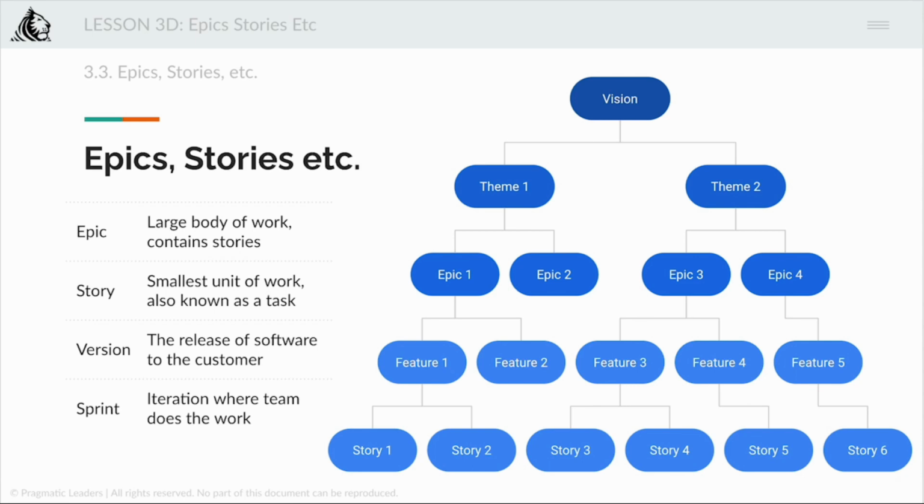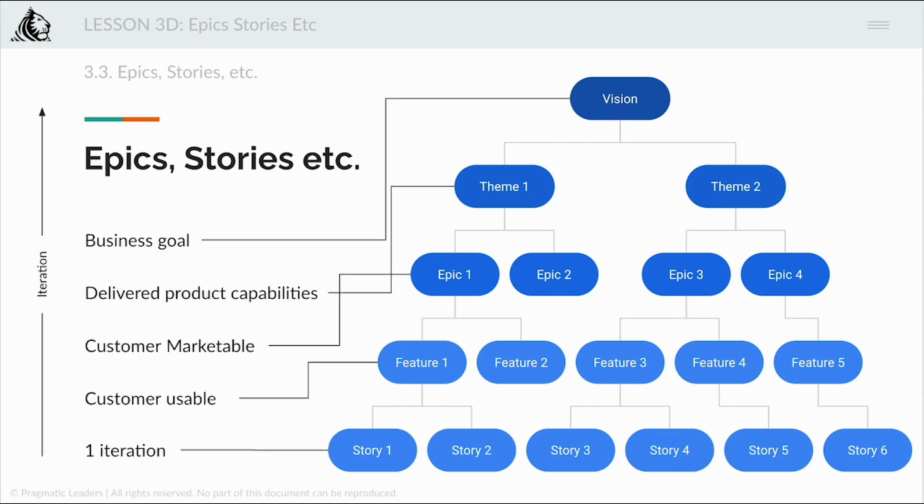Right, so version 1.0 will require at least 3 major epics to be finished, for example, right? And each epic can then have multiple stories within it, correct? And because the epic is too large, not all the stories can be done in one sprint or one iteration, and that's why it will be done over multiple iterations. So each epic can have multiple sprints. I think things will get very clear in the next few slides, right? So the work shown in the chart above could be selected to be in a version that is completed during one or more sprints, right?